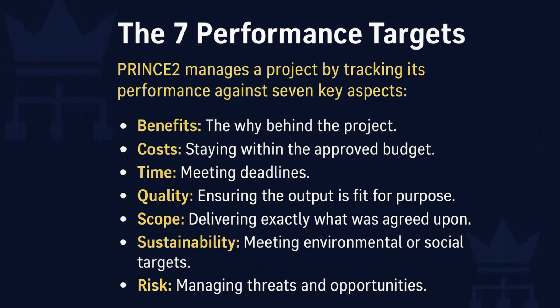Once all the planned products have been delivered and, importantly, accepted by the users, we move into the final process, closing a project, or CP. CP. Time to wrap things up. Exactly. CP handles the formal handover of the products to the operational environment, BAU, confirms they've been accepted, ensures any remaining issues are dealt with, evaluates the project's overall performance against the PID, and makes sure those final lessons are captured, fulfilling the learn from experience principle one last time.